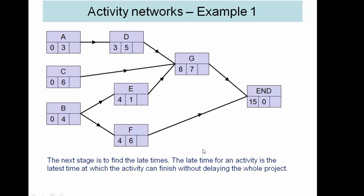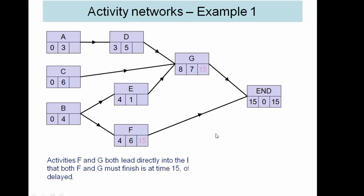To complete the network though, we now look at the latest time that each activity can start without delaying the whole project. This is always the case that the end event has the same early and late time. And as both F and G go directly to the end activity they can't finish any later than 15.